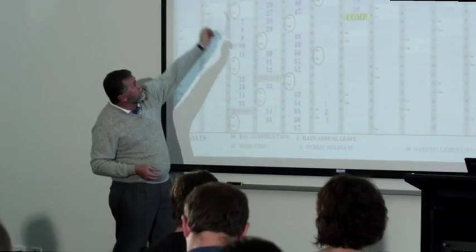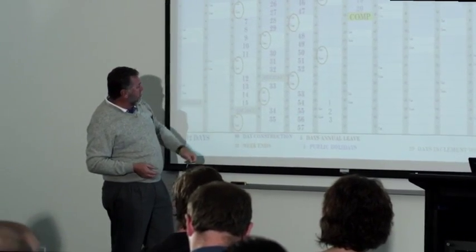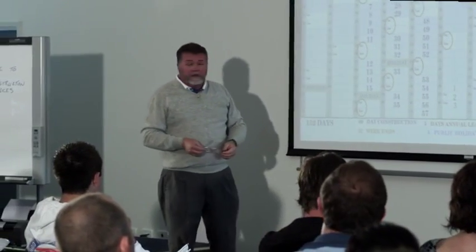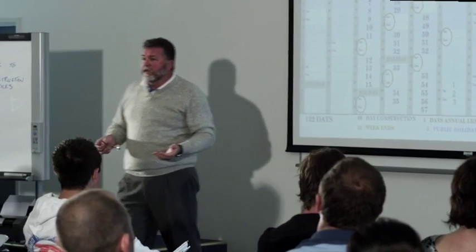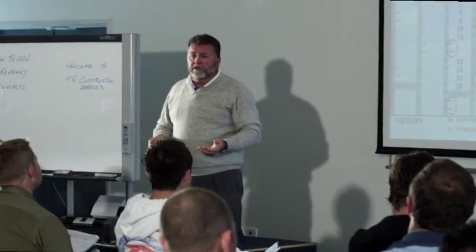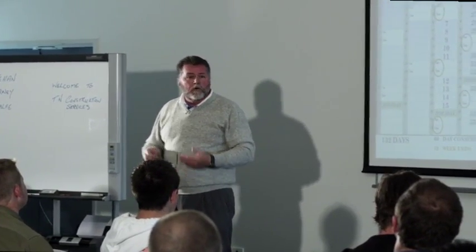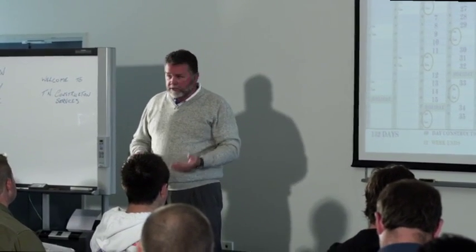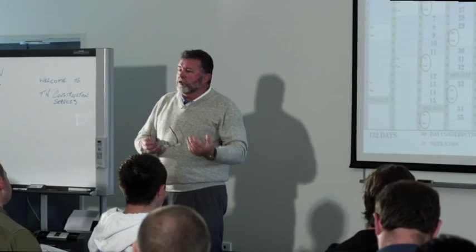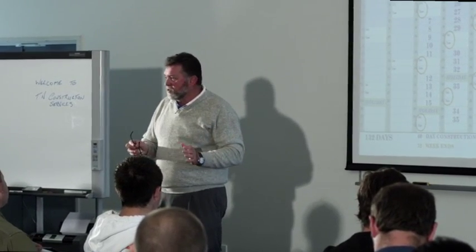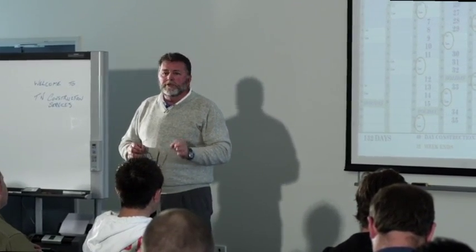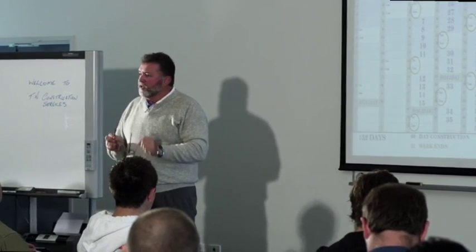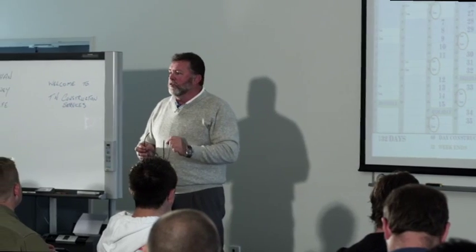I've got one, two, three, four public holidays, 16 sets of weekends, and in that as well, you might have your wedding anniversary and you're going to take your wife away for a week's holiday. So all the delays need to be included. It's what they call calculable delays. In the contracts, be it whatever type, there's also a part called incalculable delays. Now the incalculable delays, I simply say to people, put in your contract,